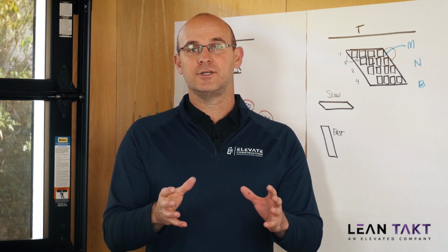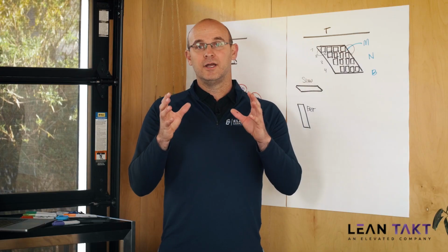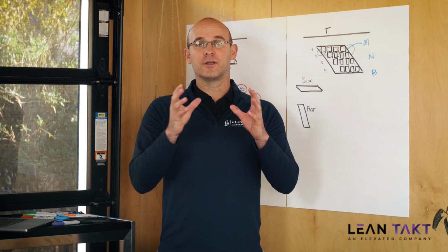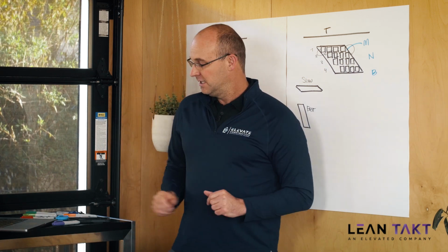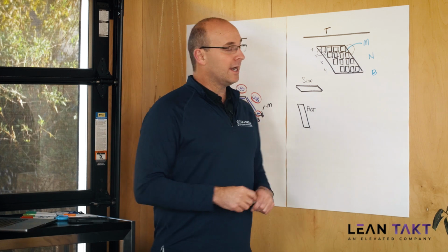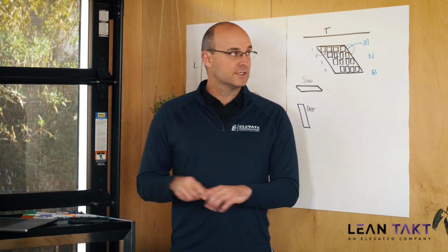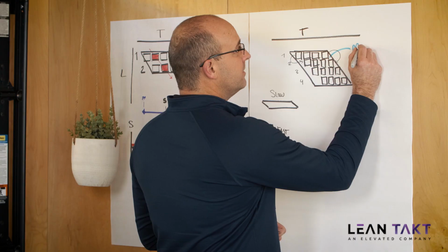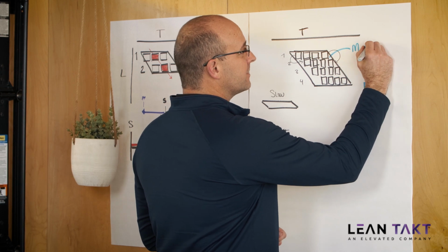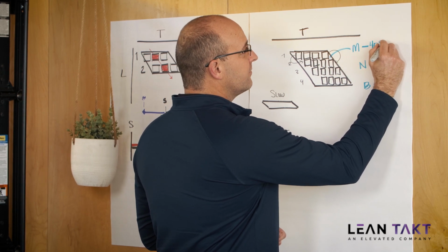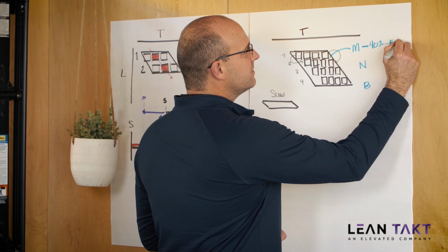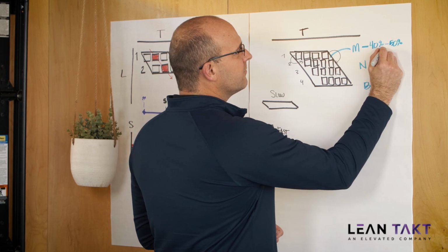It gives you a ratio or a percentage based on how fast you could go in comparison to how fast you're going. So let me tell you this. Your macro level takt plans will typically be between, and I usually say 35%, but I think I'm going to go between 40 to 50% realized flow potential.